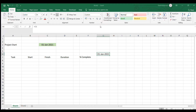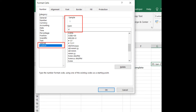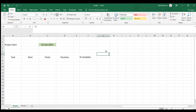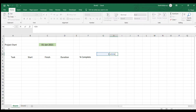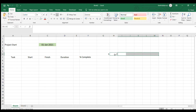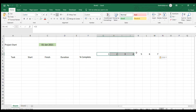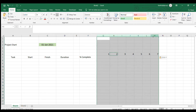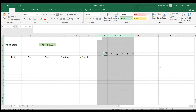I'm going to format it with just a single 'D' for the day. On the succeeding days, just use this cell plus one, then copy and paste it. Let me just work on the first seven days of the week and make this column width 5, then center it.